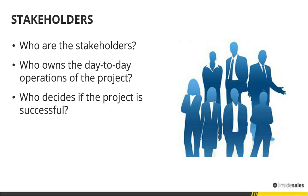And it's also really important to know who's going to be the day-to-day operator. To be successful, you need someone on the ground who's empowered. And if you're getting someone who's got their full day job and then somehow they're going to fit the integration into their extra time, you need to have a conversation about how integrating new technology means breaking old processes and creating new processes. That is a full-time job.